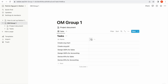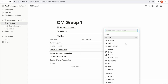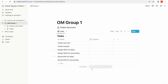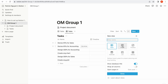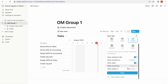I'll add a new field and name it 'Timeline'. In terms of type, I'm going to change it from text to date. Now we will create a Gantt chart. To do that, click on the plus button next to the table and choose 'Timeline', then click 'Show table' and done.